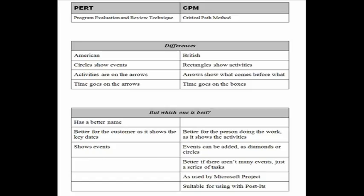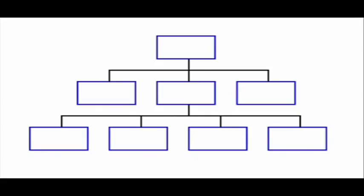And in fact, the decision about whether you're using PERT or CPM is made much earlier, when you're listing the tasks. Because if you list activities in a work breakdown structure, then you're going to end up using CPM. But if you list deliverables and you have a product breakdown structure, then you'll end up using PERT.